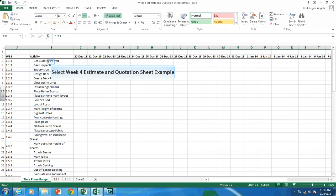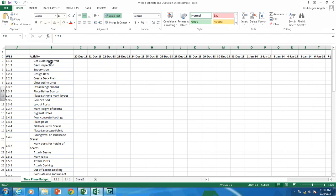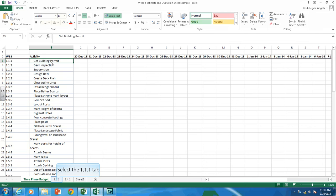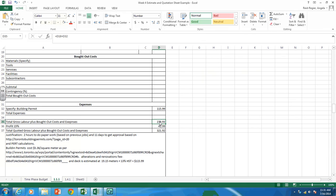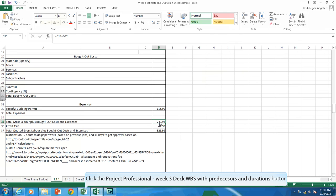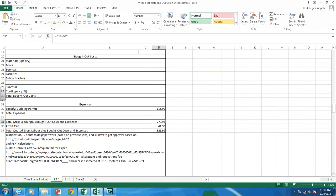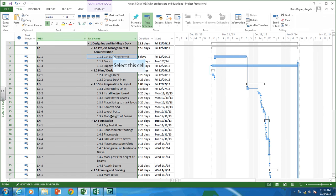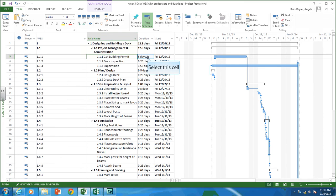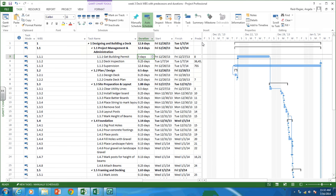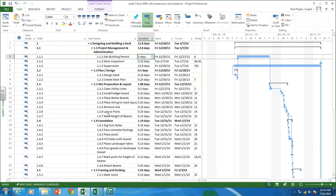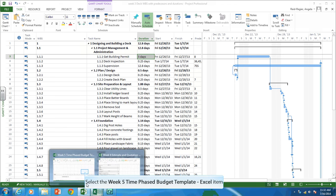So we're left with just work packages. So now we want to time phase our budget. Our first activity is Get Building Permit. And if we go to that work package estimate and quotation sheet, we see our total cost is $279.93. We don't want profit in with our budget. Profit's not part of the budget. It's part of the price. So we need to time phase that over the period that it's occurring in. And to see when it's happening, we go to our Microsoft Project schedule. And we can see getting a building permit, in my case, is taking five days. And it's starting on December 20th and finishing on December 27th. And there's two Saturday and Sunday in there, so work isn't happening. So I want to schedule, spread that $280 over five days, but not on the weekends.